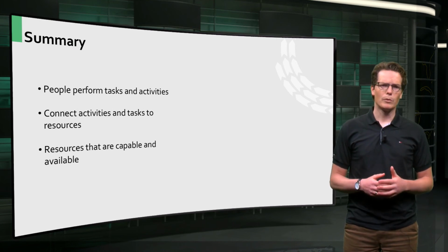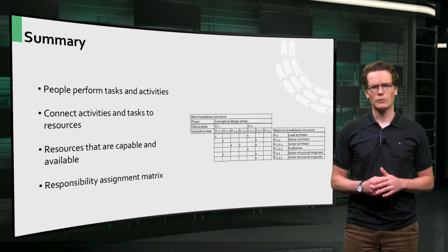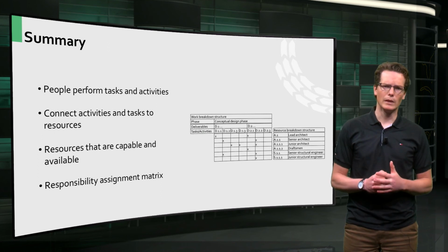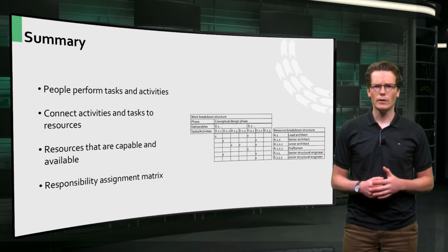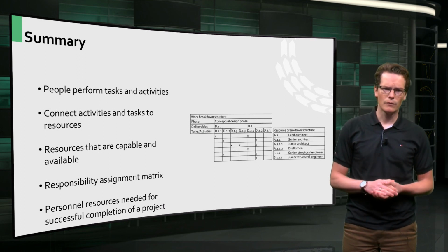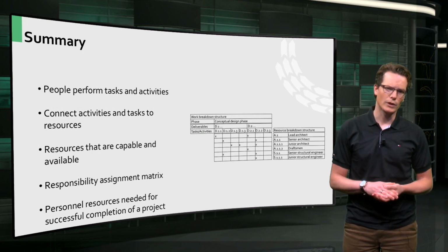By merging the work breakdown structure with the resource breakdown structure, you can create a responsibility matrix. When you've done this, you will have an overview of the personal resources needed for successful completion of a project.